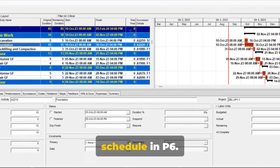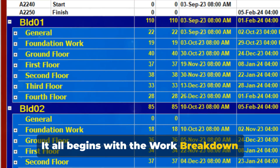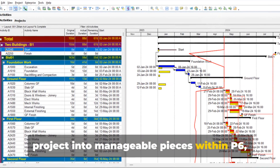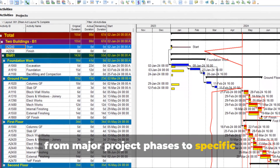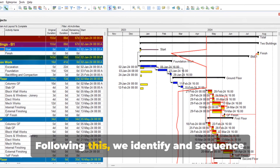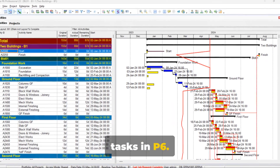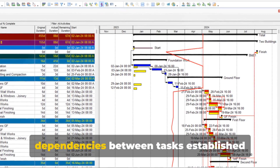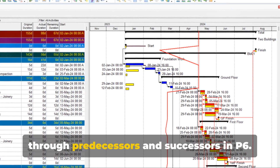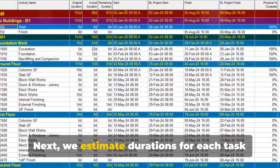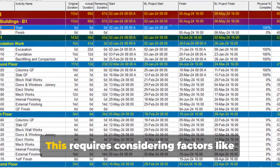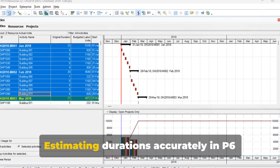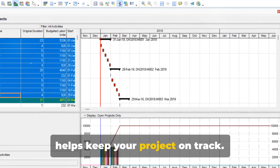Now we transition to building the schedule in P6. It all begins with the Work Breakdown Structure, or WBS. This step involves breaking down the project into manageable pieces within P6, from major project phases to specific tasks within each phase. Following this, we identify and sequence tasks in P6, defining individual activities and their order, reflecting dependencies between tasks established through predecessors and successors in P6. Next, we estimate durations for each task in P6. This requires considering factors like complexity, resource availability, industry standards and bill of quantities. Estimating durations accurately in P6 helps keep your project on track.